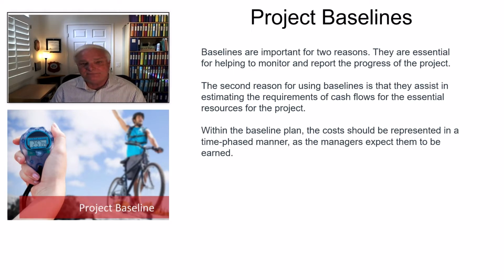Now, as I talked earlier about creating, I'll call it a project baseline. You were given an initial budget, and that initial budget, once you loaded it into your WBS and you've got your first, I'll call it Gantt chart view, is your initial baseline. You can call it a draft baseline, you can call it a preliminary baseline, but that is a baseline. It is in essence where you laid out all of the costs, all the schedule, and said this is what we're going to start working to.